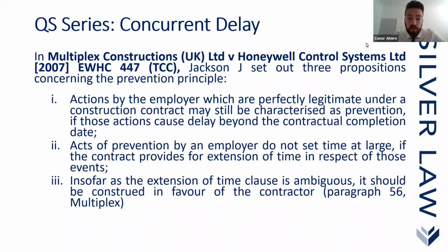The second point is that acts of prevention by an employer do not set time at large if the contract provides for extension of time in respect of those events. Now, this was a very common type of argument in the past, where if the employer delayed the contractor and the event was not catered for in the extension of time provisions, or wasn't listed as a relevant event, then the contract didn't cater for that extension of time, and time became at large in those circumstances.